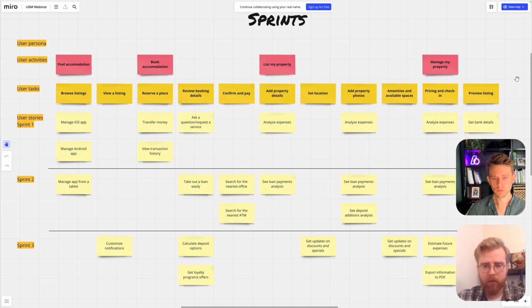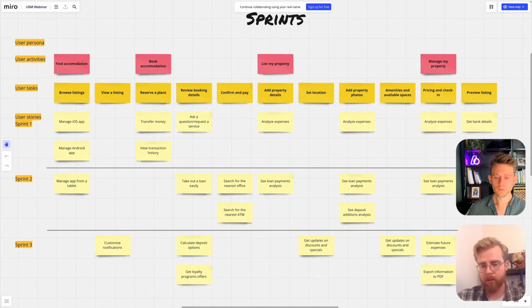So there's no milestone here. There's no lever that we can pull to prioritize a new holistic end-to-end increment of value for the customer. And sprints are not tied to outcomes. So it's unlikely that if you're working like this, you'll be having a conversation about pushing sprint 2 out 4 months because our assumptions have changed or there's a more immediate need from a customer. And those are the types of prioritization discussions you should be having and need to be having in the story map. So this is a problem.